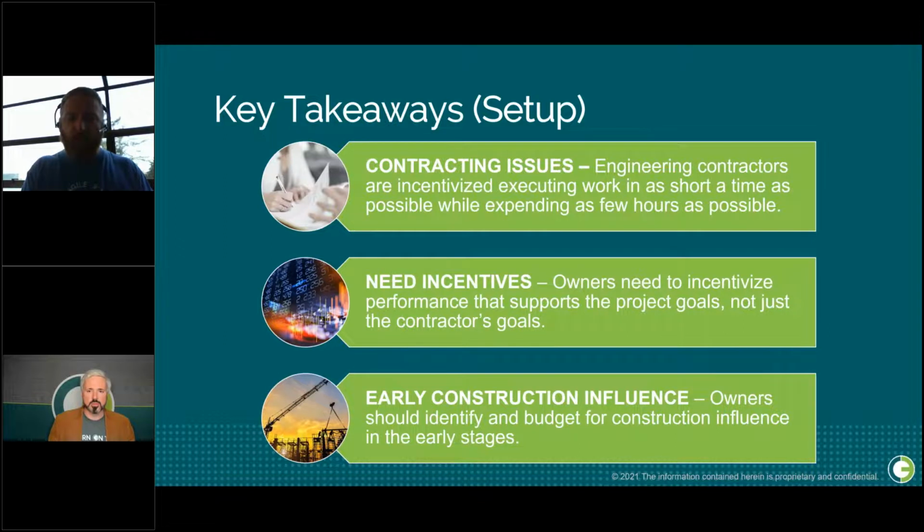So you can do it in what I would always describe as a sort of negative or limited way, where you can say some part of that contractor's fee is at risk or held back pending successful execution of AWP, the engineering deliverables, getting our EWPs on time, getting our information from engineering in the sequence that we agreed. Make sure they have some skin in the game. And that's the way that certainly if you hold it back, they're going to be very, very incentivized to make sure that they get it done on time and in sequence.